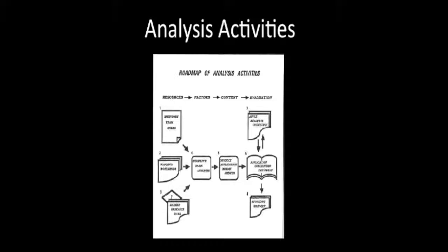In the analysis phase, the project manager evaluates the project proposal to determine the objectives of the multimedia project. The project proposal serves as the input of the analysis phase of the project. Time and money are spent to do an alternative analysis of the project. This ensures that a multimedia product will solve the problem. Once it is determined that a multimedia product will solve the problem, an application description document is generated.